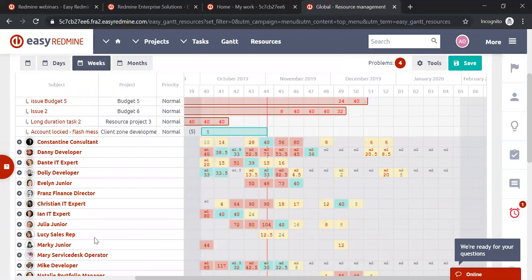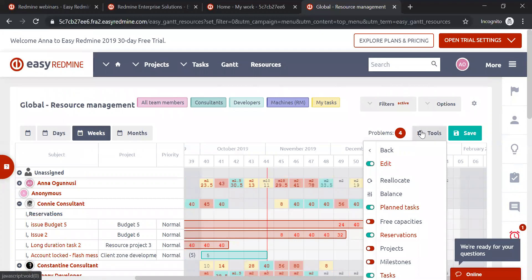That's one improvement in resource management. The second one is called Balancer, released in October. To use this feature, go to Tools and Balancer — it can be used at both the global level and project level. When you click it, all allocated hours of all displayed user-assigned tasks that are expanded and visible on the timeline will automatically redistribute throughout the entire task duration based on the user's free capacity.